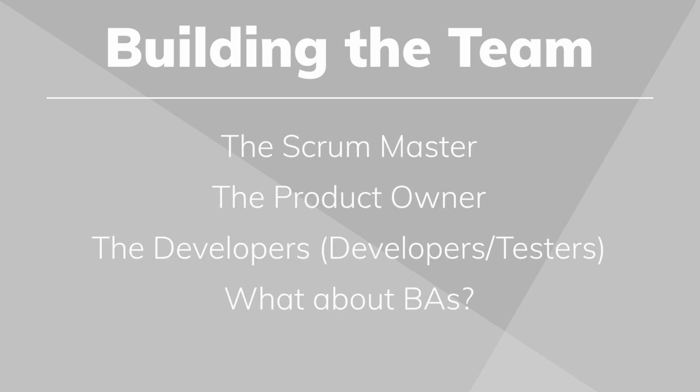So we're looking at building our team. There's basically three entities in an Agile team. There's the Scrum Master, and that's the person that's making sure that we're all being scrummy, basically following the practices of a Scrum project. That's things like having the daily stand-ups. They usually conduct the stand-up meetings, making sure everybody gets a chance to talk, making sure everybody's represented. They also make sure that we do all of the ceremonies, like the demonstrations at the end of a sprint, like the retrospectives, and they make sure that basically any obstacles are removed. That's the Scrum Master's job.